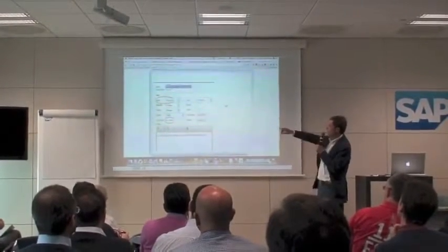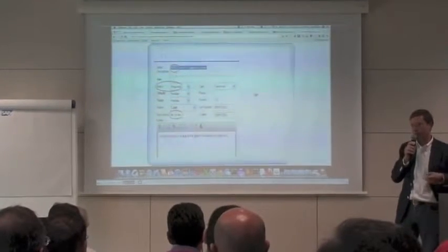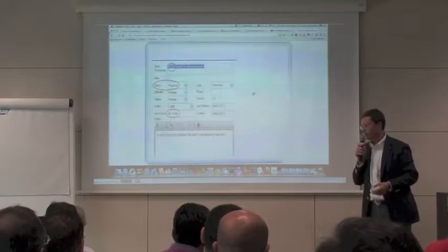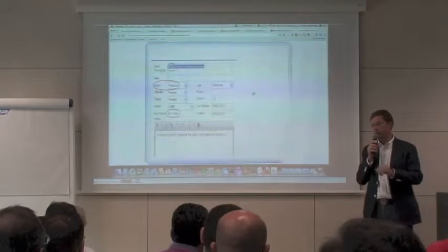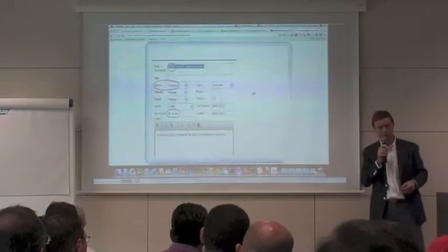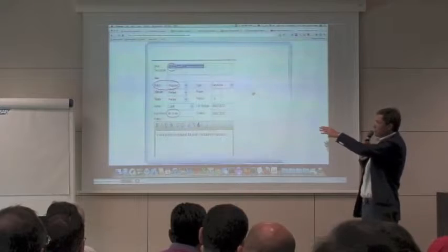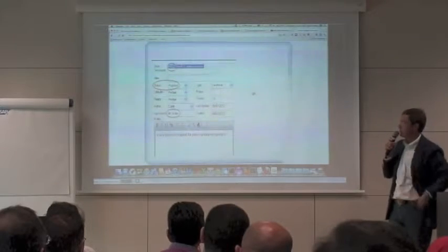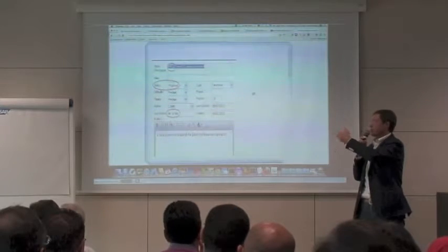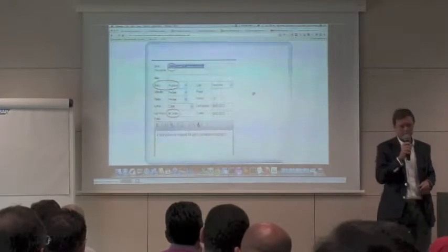As I was showing you before, each requirement has a number, and this is important, and a status. We keep track of the advancement. Basically, a proposed requirement is just a note. We don't know if it's a real requirement, then we verify it, we check with the user, we do quality assurance, and so on. There are several other attributes. We keep track of the key user that gave us this requirement, and this is quite a rich interface because we can link to this item files, external resources, and so on.